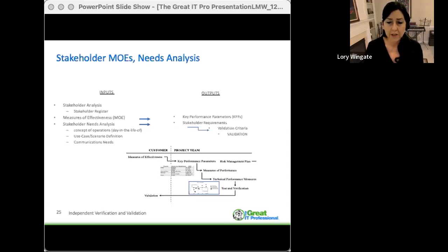Remember that the project management methodology or methodologies that you're using is going to impact your stakeholder involvement, right? Projects that accept a lot of change out of cycle, that might have low architectural design maturity, that are working at a slower tempo, or have a high degree of user involvement needed, those are going to impact your approach.